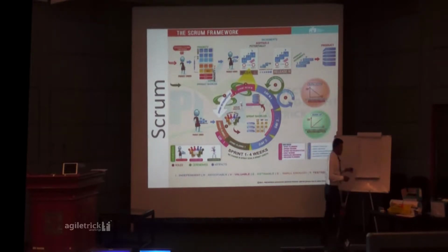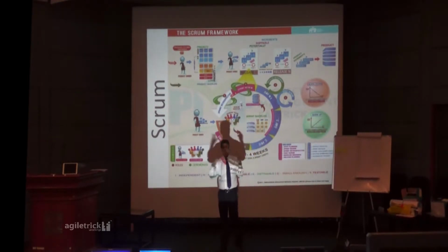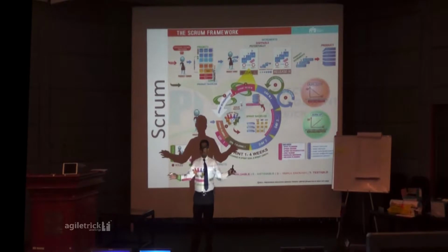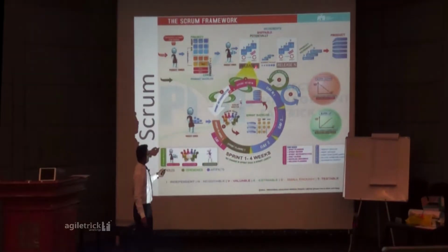Assume your release calendar is the financial year 2016-17. We have 4 releases in a year, so every 3 months is a release, release 1 to release 4. Suppose I have 2-week sprints. In a release of 3 months, I can have a maximum of 6 sprints, isn't it? You all are with me, right? Similarly, if I zoom into any of your sprints, it should look like this.